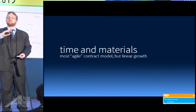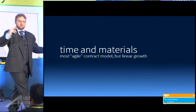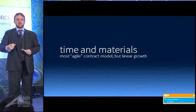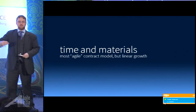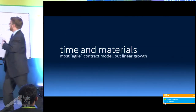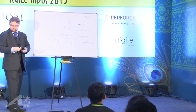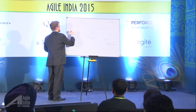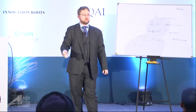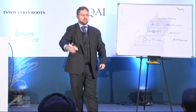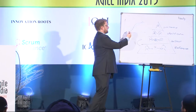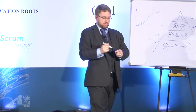What are the ideal contract models? Time and materials — everyone knows what time and materials is. Why is this ideal for Agile? Because nothing is fixed apart from an hourly rate or a daily rate. As a customer, working with me as a product owner or embedded within the team, you can do the backlog grooming and change, as long as there is value. If we think of cost as a linear expression, every iteration we're going to spend a fixed amount — say 100,000 rupees — to deliver work. We have a fixed team size: that is our linear cost progression.